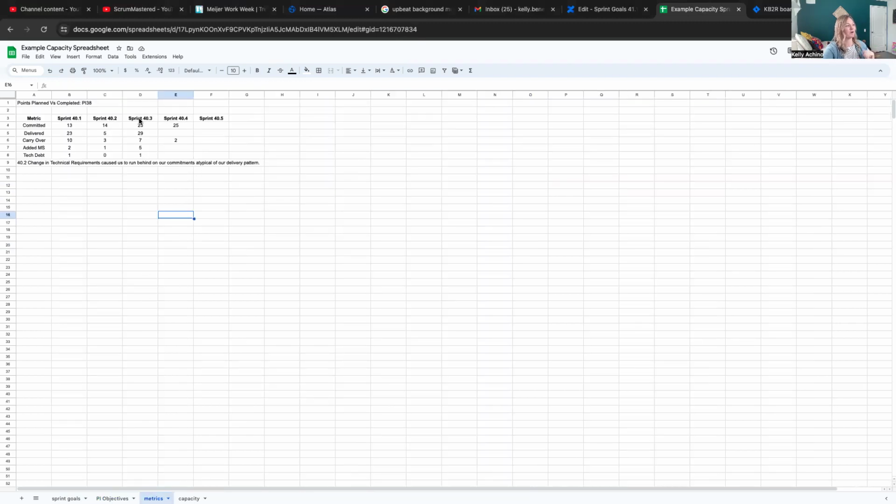And usually we'll look over the last sprint's metrics quickly, and we'll check out what we committed to for that one particular sprint, and what we were actually able to deliver at the end of those 2 weeks. Any carryover tickets. If we started the sprint with a lot of carryover work from the last, that helps me track patterns and try to improve there.